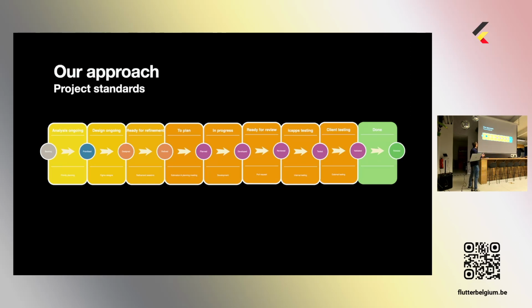by the client, we put it in design ongoing, because one of the things we learned in the past is never go without the design. I have a couple of clients that we work together with. I can tell you some names, but I won't, where we didn't use any design. So the client just told us, I want this. Okay, we build it, and after that, requirements changed or his idea was wrong. So basically, start with designs.